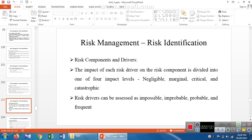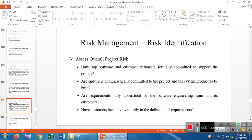The impact of each risk driver on the risk component is divided into four impact levels. Negligible — not taken care of by risk management. Marginal — a borderline case, no need to worry. Critical — we must consider risk identification and risk management carefully. Catastrophic — very high risk, requiring changes in the development phase. The risk drivers can be assessed as: impossible, improbable, probable, infrequent, and frequent.